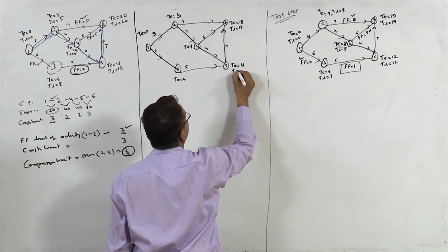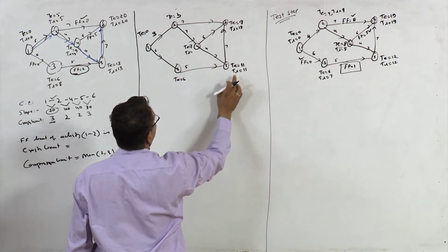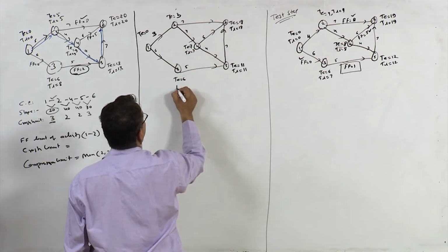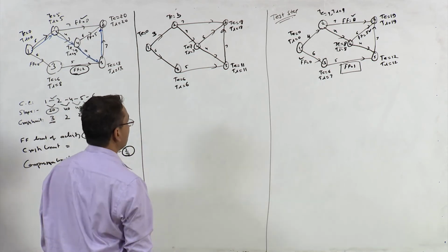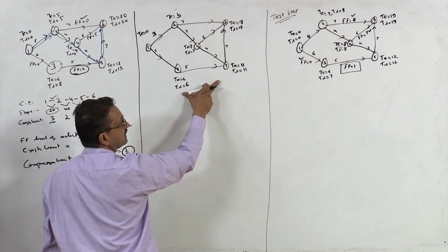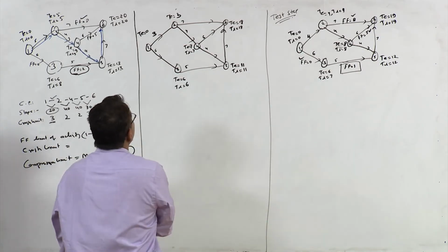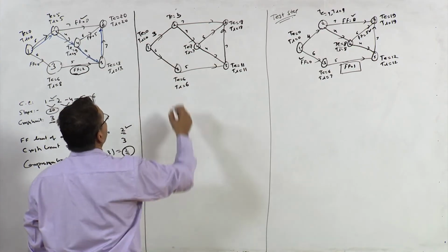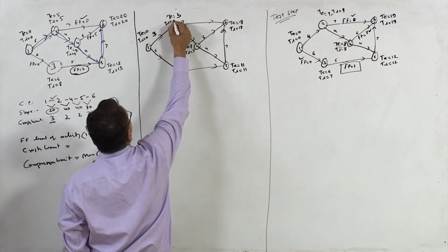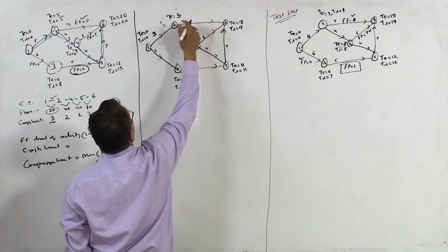So when we take this value as 3, this is our TE at the last node. So TL is 11, TL here is 7, and TL here is 11 minus 5, which is 6. This has now become critical, which is what we tested over here. TL is equal to 0 and TL at this node is 3.